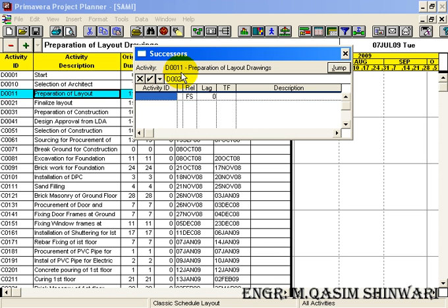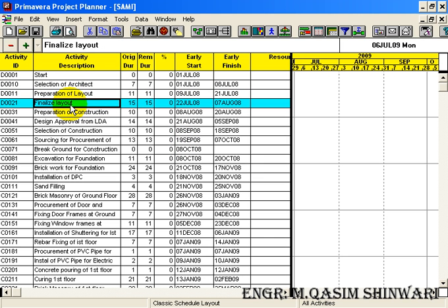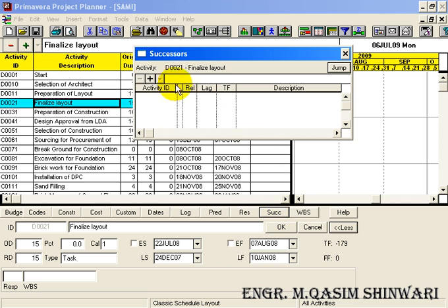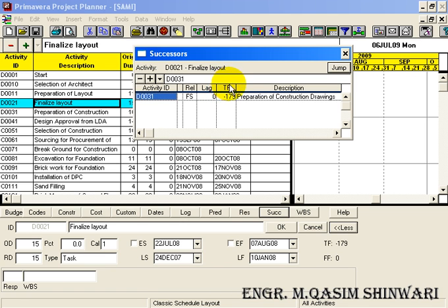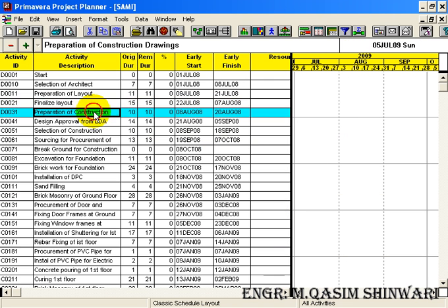Press Enter on your keyboard and close it. The fourth method is to double-click on an activity. Double-click, go to Successor, add a new successor D0031, and press the Enter key. Click OK and close it.